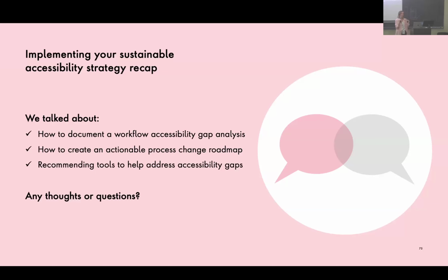If you can get the product owner to also help push for these processes to get into place, then that works so much better. It's really horrible to be the accessibility specialist waving their arms in the corner going, how come no one showed me the designs before they showed the stakeholder? You really need your project manager, program manager to help make sure that they're enforcing it, so they have it as part of the definition of done, for example.